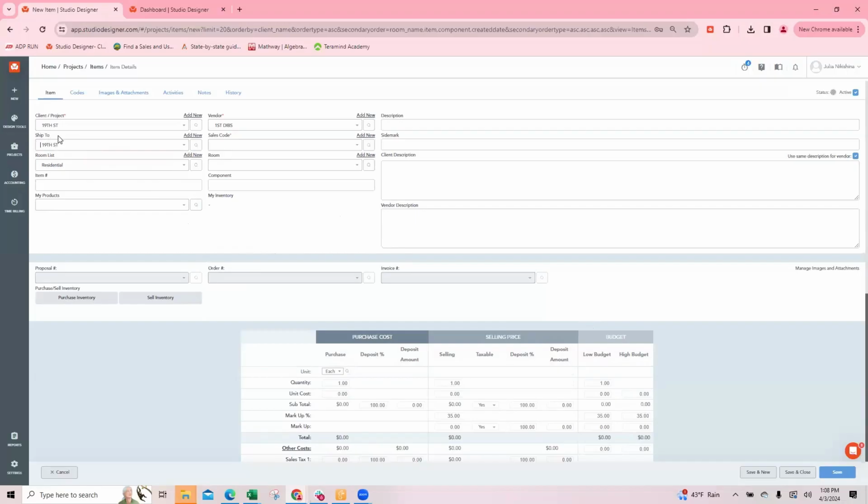You could utilize it if you have items going to a receiver. And so if you have some products going to a receiver and some products going maybe directly to a home or to your office, you can build out a customized expediting report that can be sent to your receiving warehouse by utilizing the ship to. So the ship to really should be accurate. It should reflect where the product was sent, regardless of whether or not your purchase order is sent to the vendor. Just remember that. Also, your ship tos need to be consistent.